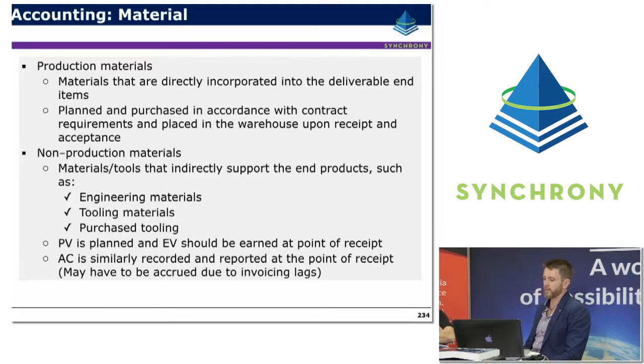The actual cost is similarly recorded and reported at the point of receipt, so the idea being that at that point the earned value and the actual costs are both earned and accrued at the same point in time.